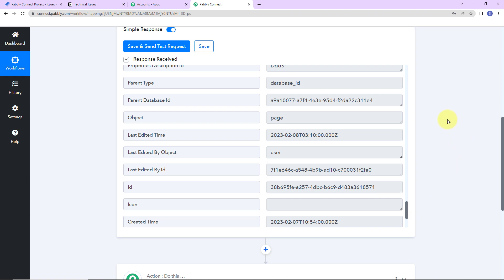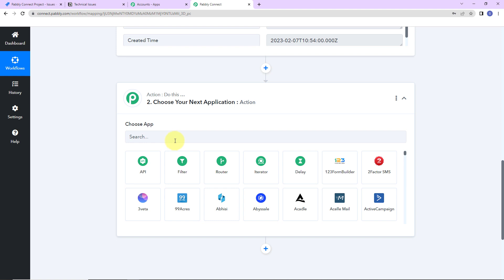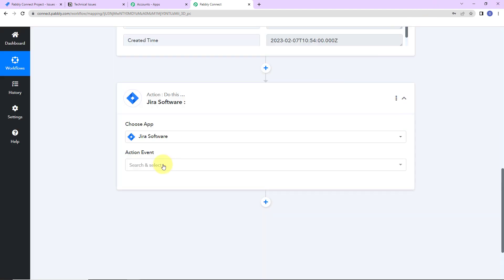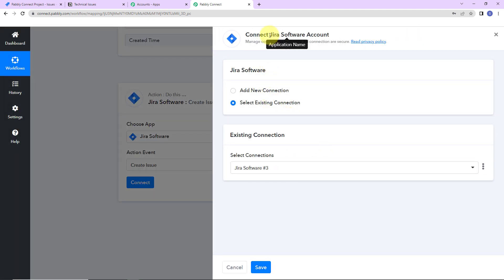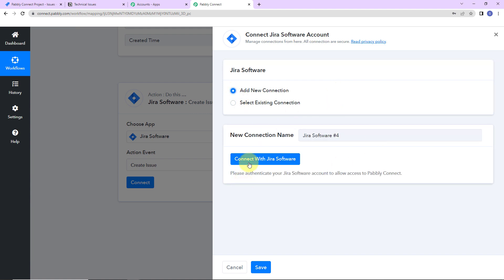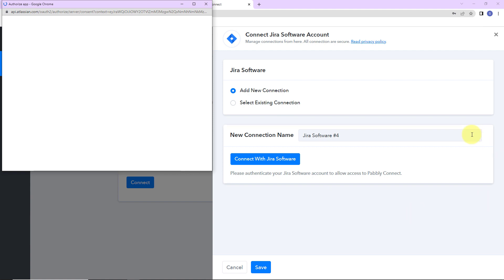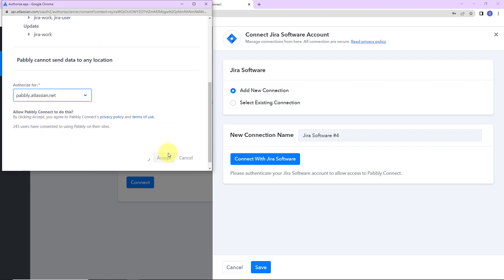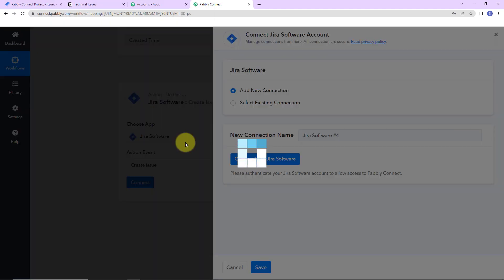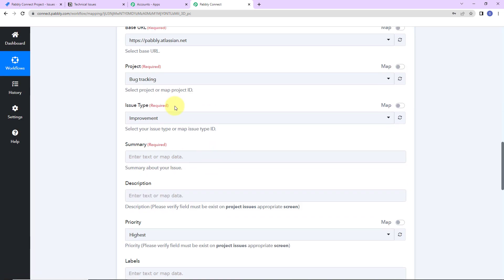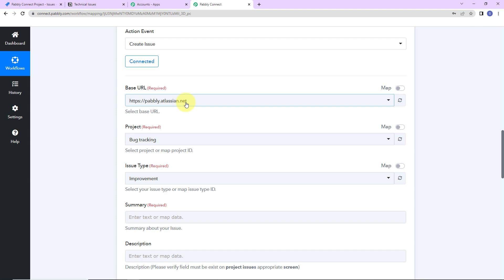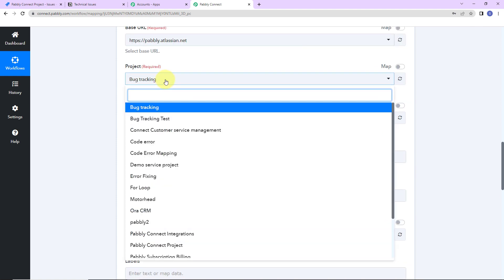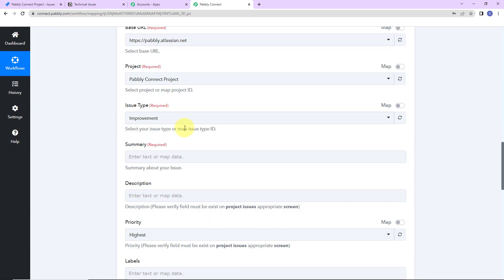Once we have received this information, my objective is to create a Jira issue, so my action application would be Jira software. The action event here would be to create an issue. Let's click on connect — again Pabbly Connect is asking to connect with a Jira software account. I'll click add new connection, then connect with Jira software. Pabbly Connect is requesting access to my Atlassian account. I'm going to select the site and then accept. The authorization has been successful. Now I have to map the information: the base URL has already been selected by the system. For the project, I am working on the Pabbly Connect project, so I've selected that. For the issue type, there is a bug — the API is not working.